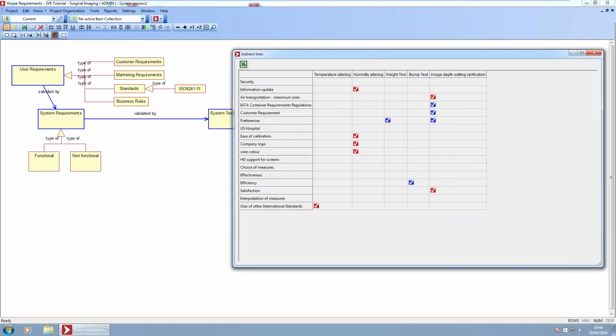And as you can see here, those traces also take into account the suspect relationship in the path. Okay, so I can check in here all those tests marked in red are basically tests that I will need to run again, or I will need to rewrite in order to support the changes. Okay.